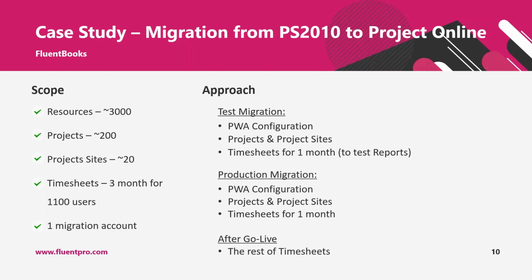Timesheets migration was also part of the effort. There were 3 months of timesheets for 1,100 users to be migrated, and we had one migration account, like a service account, that could be used for data download and upload.